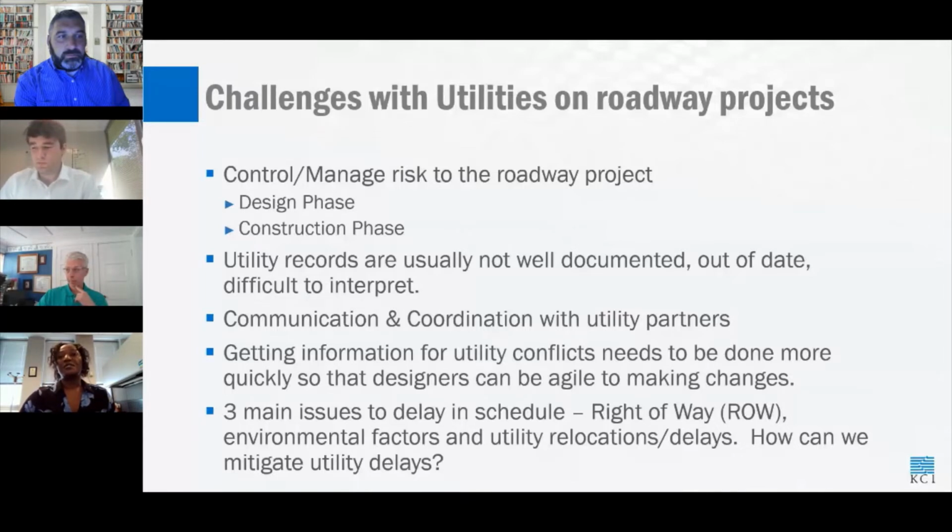Utility coordination is an ongoing process through the life of the project, and when design changes occur, utility conflicts have to be reassessed. I can't tell you how many times I have seen a project go through an initial assessment to identify utility conflicts, and as we all know, design changes occur. Often these changes affect utility facilities and the utility owners are left out. So it is important to communicate design changes to our utility partners so all parties can plan accordingly.